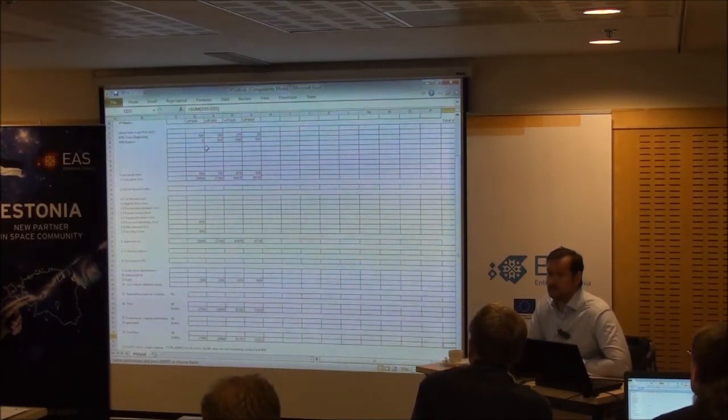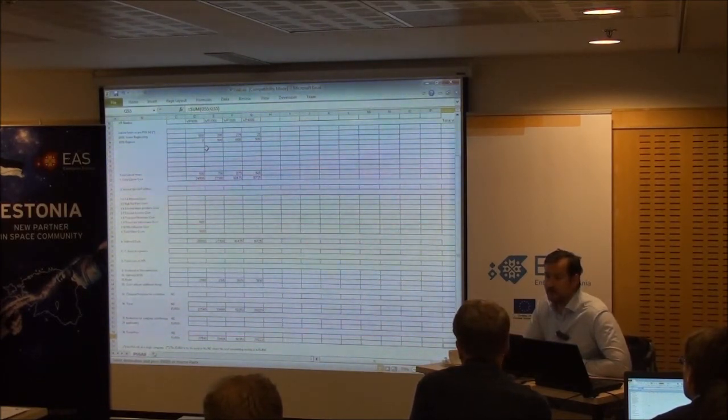And the same goes for your subs. If they've given you the number of hours, and it looks weak, particularly depending on the sub, if the sub is a very small organisation, one or two guys, you need to query that, or be prepared to pick up the work, because if they fail, you might be failing.